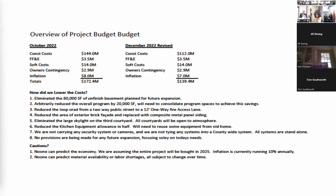Yes. The city of Dover has impact fees and tie-in fees. When you go to get a building permit, they're going to require a percentage of whatever the total cost is, and you have to pay the city of Dover. So all those fees are in there, unless we're in a position of negotiating some of them away with the municipality, which is the process, and we have been successful at that in the past. The cost of the building permit and all those things would have to be negotiated with the city of Dover. I can tell you it costs $10,000 a time for a single family home in the city of Dover. That's just plain facts. That would all have to be negotiated.